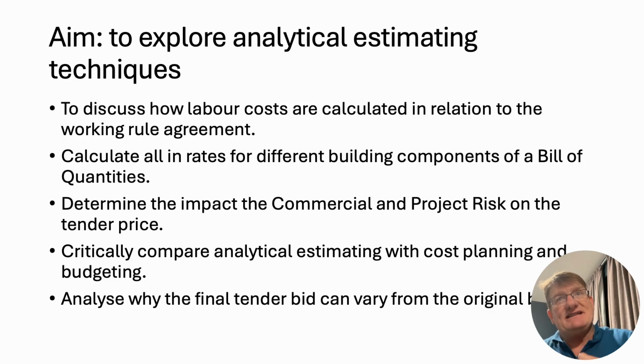In many respects, you are going to require some historical data. You know what I mean? Like, it takes, say, 1.5 hours to lay a metre squared of bricks. So that's historic. It takes 0.25 of an hour, maybe 0.15 of an hour, actually about 8 to 10 minutes to lay 1 metre cubed of concrete.